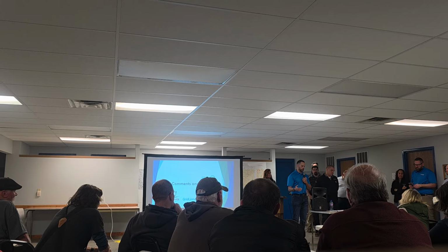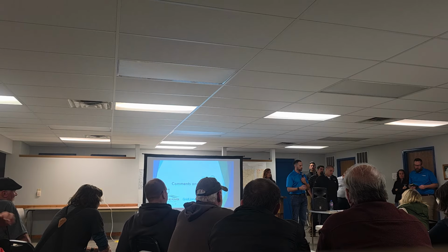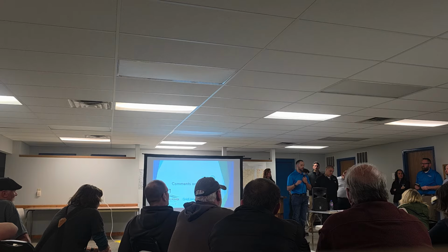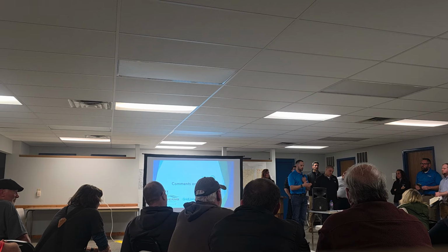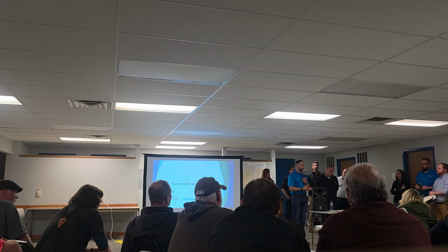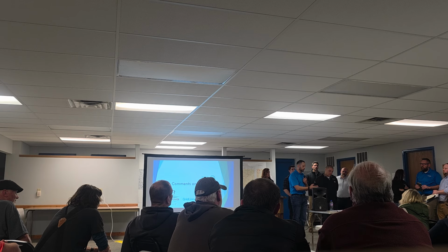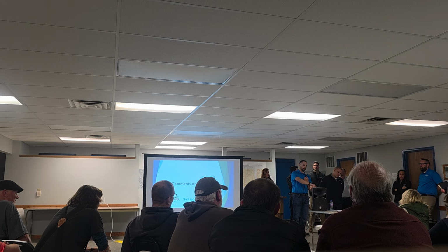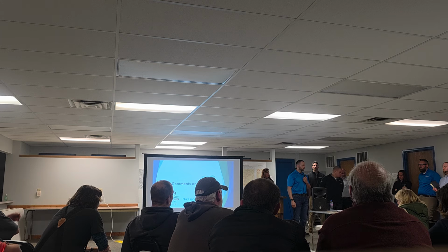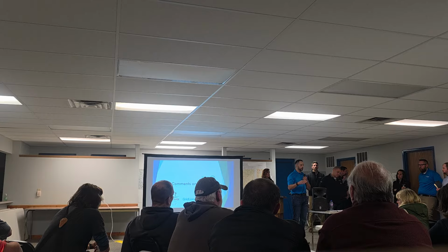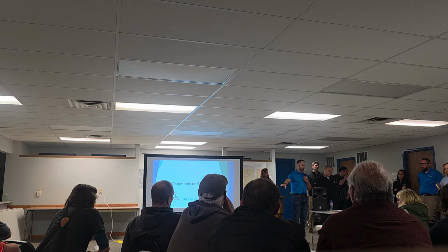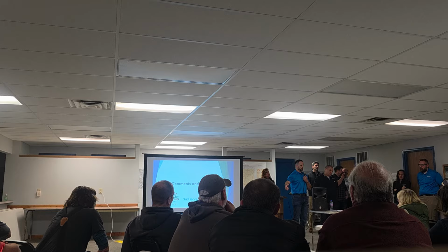Expanding on the accountability side of things, to summarize the latter part of your question: typically, the contractors will hire a third party. If it's environmental and there's a species concern, anything associated with that, they'll have environmental people, and a lot of times one of their side jobs is SWPPP compliance. There's a couple of different delivery platforms on that. That can be a complete third party environmental entity making sure that we are adhering to the stormwater pollution prevention plan.